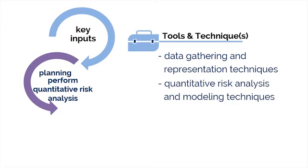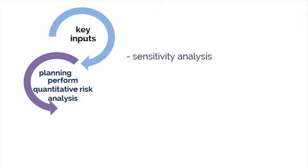Let's break this down into three techniques. First, a sensitivity analysis can help determine the risks with greatest possible impact on the project. The most common means of graphically depicting the results of the sensitivity analysis is the tornado diagram. It's really about changing the model and observing its behavior, and is the best method for practical decision making. Sensitivity analysis is very useful when attempting to determine the impact the actual outcome of a particular variable will have if it differs from what was previously assumed. By creating a given set of scenarios, you can determine how changes in one variable or variables will impact the target variable.